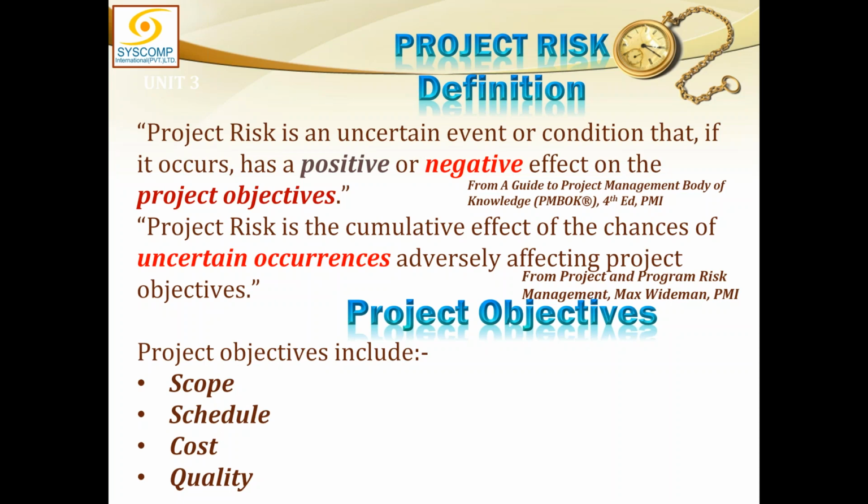And now coming back to risk, any uncertain event which could positively or negatively impact any one of these objectives is a risk. This is the definition of risk. If you think there is a risk which is not impacting scope, time, or cost, for all practical purposes, we do not consider it a risk at all. It is not a risk. If it is not having any impact on the scope, time, or cost of the project, then we do not entertain any such thing as a risk at all.